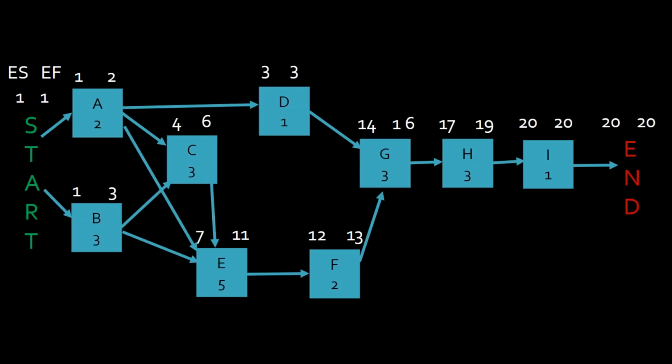But this is how you calculate the forward pass. I don't know exactly the page, but go into time management, Aubrey, and you'll see an example of where they're doing the forward and backward pass, and this is how they calculate the durations. This is exactly right because it's real world. Remember, 17 is an actual work day. I have people showing up to work and doing stuff. I know because I have to pay them. 17's a day, 18's a day, 19's a day. On the beginning of day 20 is when I hand it off to I. It's 9 o'clock in the morning on day 20.